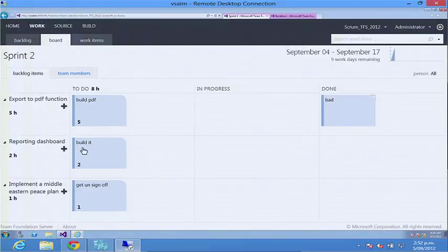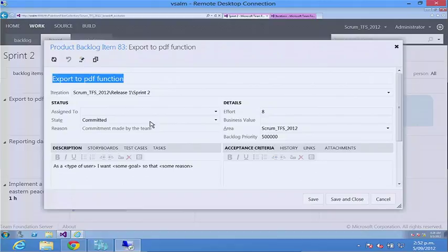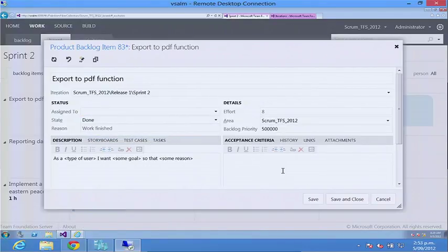So we go through and we can clear our items. One thing to note here, I've done all the tasks on this particular feature, and if I open this, it still isn't done. Finishing all the tasks is not going to automatically update it to done. That was a deliberate decision on the part of the team because lots of Scrum teams want the product owner to eyeball it and go, okay, now I'm happy. They want some kind of extra step, so you've got to do this manually. Yep, you could change that in your process template if you want.